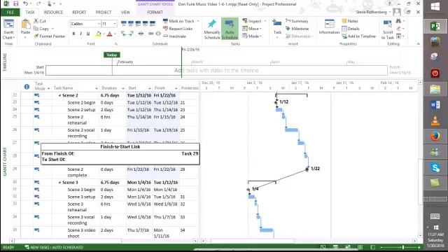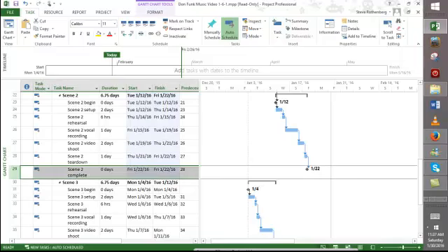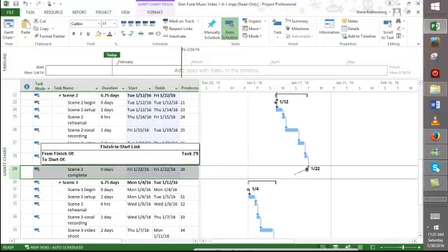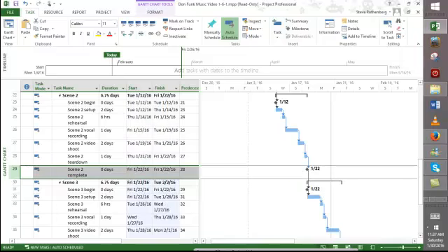And actually, I don't know if you can see this, but when you are hovered correctly over the new task, if you look at the dialogue just to the left, of course, if I let go of the mouse, you won't see it. But notice how there's a box that says finish start link. As soon as it knows where it's landing, you'll see that it says task 31, and that's that milestone. So now I should be good to let go, and it's done. So we've accomplished step 6.